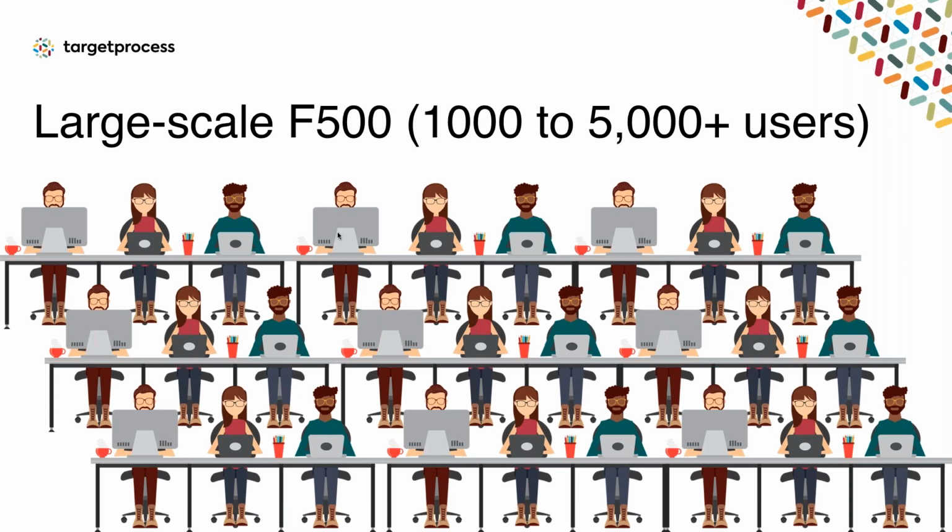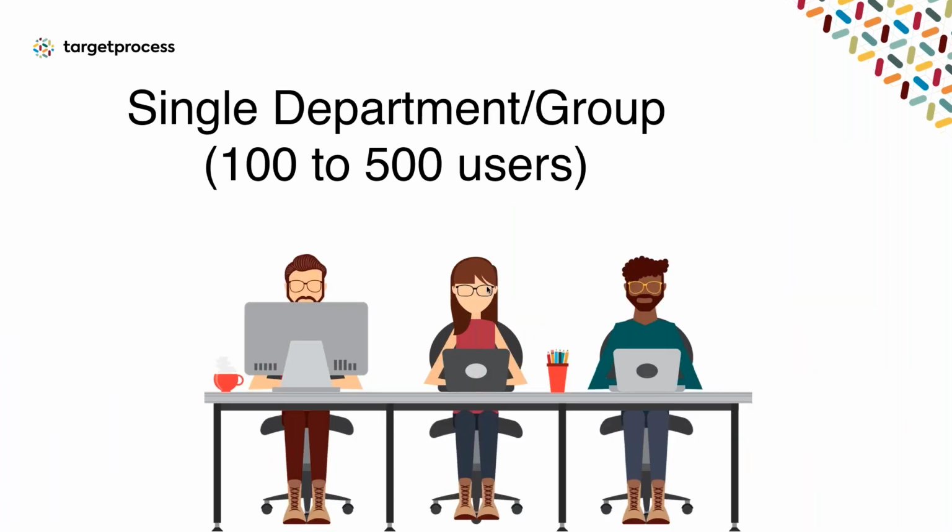And when I'd gone in there to just start with some lean agile, the big thing was clearly 2 problems they had, which was a lack of visibility and a lack of an intake process, meaning they were just overloading things. And one of the first things we did was actually create on a whiteboard all the things that were in play in the organization, and it astounded them. One person had listened to some of the things I was talking about, those 2 things, visibility of work and an intake process, and she put it on a board, and the impact was dramatic. It was where people realized they had so many things in play. That was partly why they couldn't get anything done.